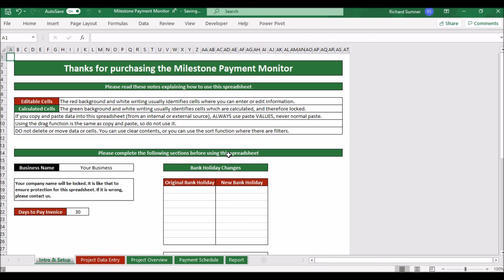So say you've got to finish phase 1 of the project, and then invoice, and then finish phase 2, and then invoice, then finish phase 3, and then invoice, that kind of thing. And you schedule your payments throughout the process, and you need to finish certain tasks in order to be able to issue each of those invoices. If that sounds like something you do, then this is the one that actually tracks that. Let me show you how it works.